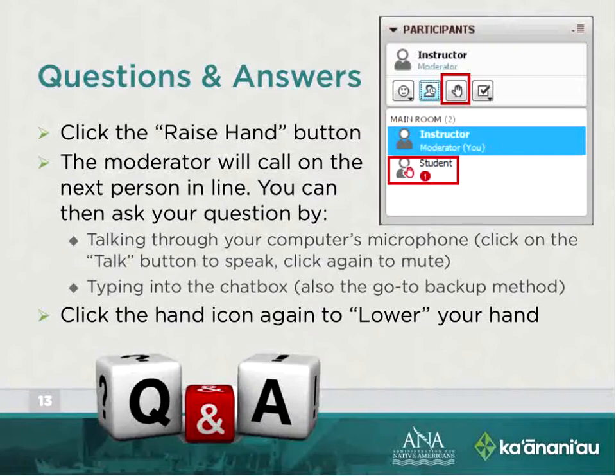We have one more question from Angela, and Angela asks, can we move between personnel and other direct costs without prior approval? Yes, as long as it's not key personnel. If it's key personnel, then we want to know how that impacts the project. All right, does that answer your question, Angela? Yep, she says yes. Okay.